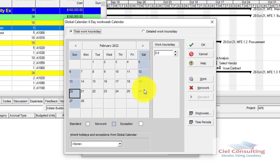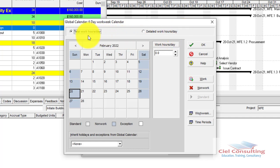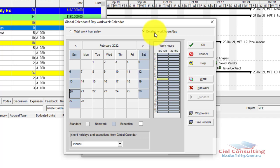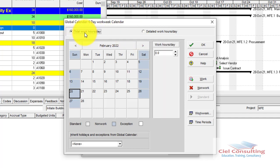There are two ways to make Saturday a working day: using the Total Work Hour/Day view or the Detailed Work Hour/Day view. With Total Work Hour/Day, you simply enter eight hours for Saturday at a high level. With Detailed Work Hour/Day, you can customize specific working times — for example, choosing that work starts at 9 a.m. or 10 a.m. I'll demonstrate both methods.